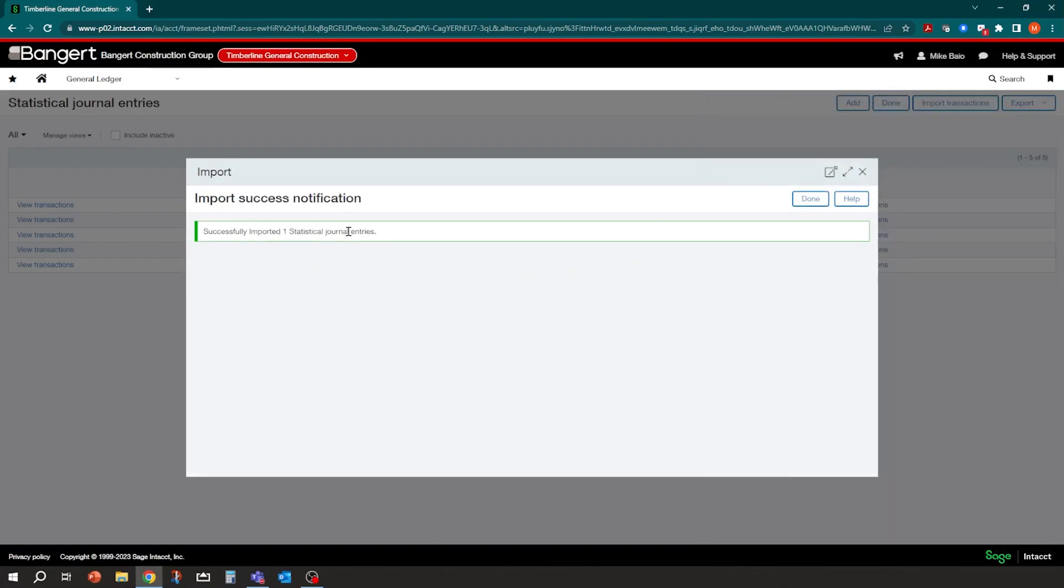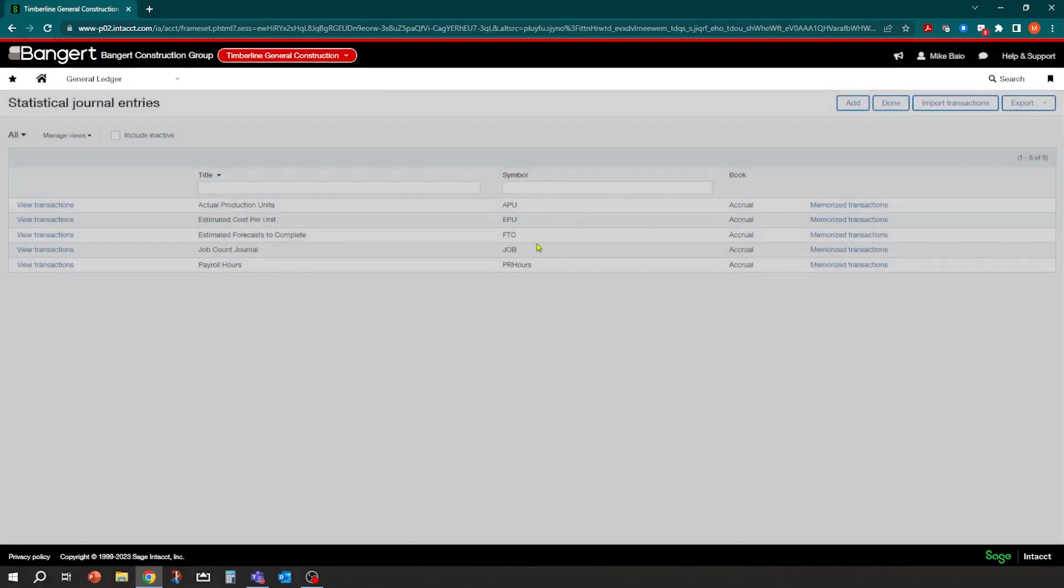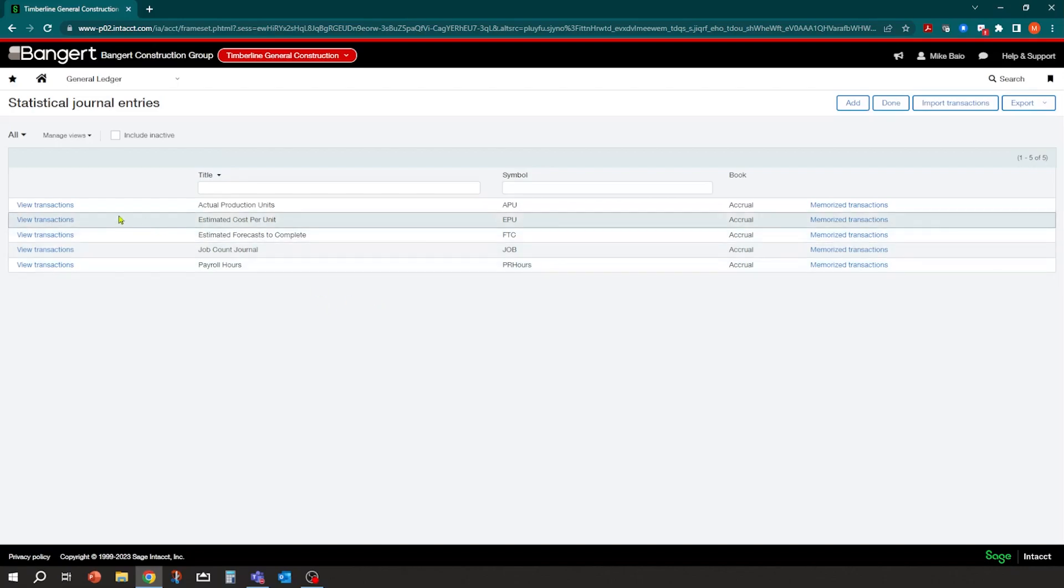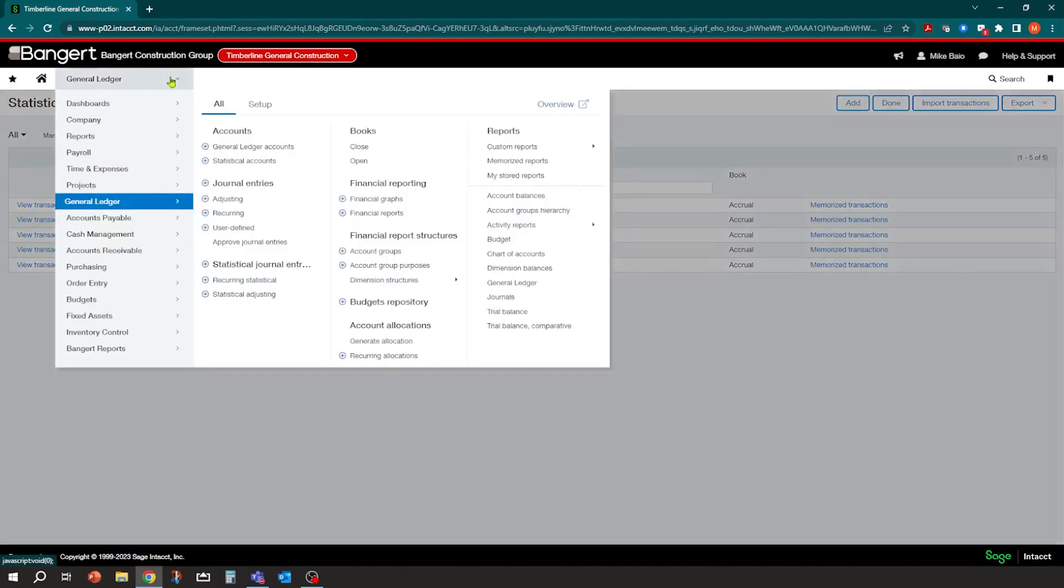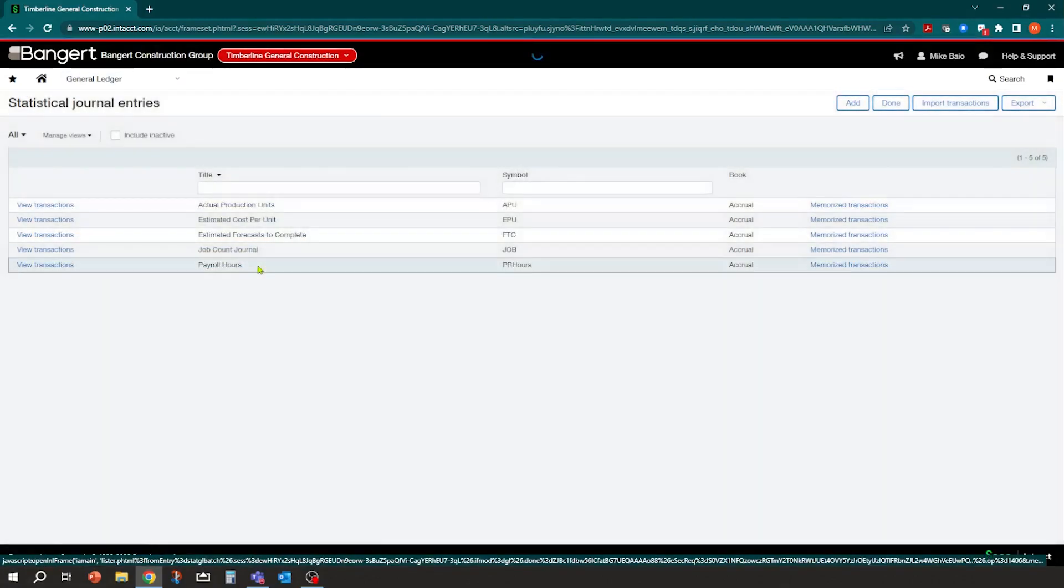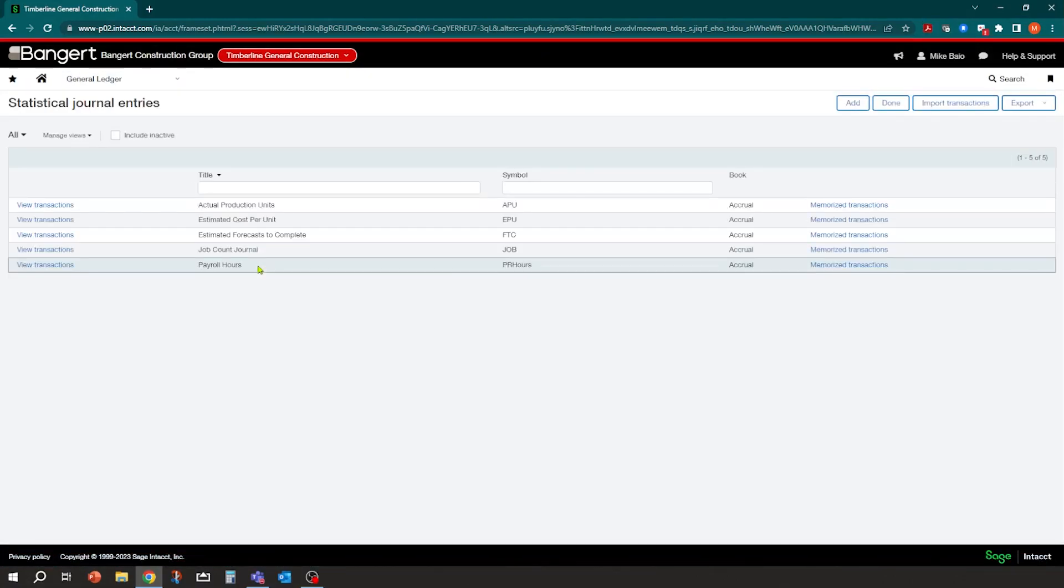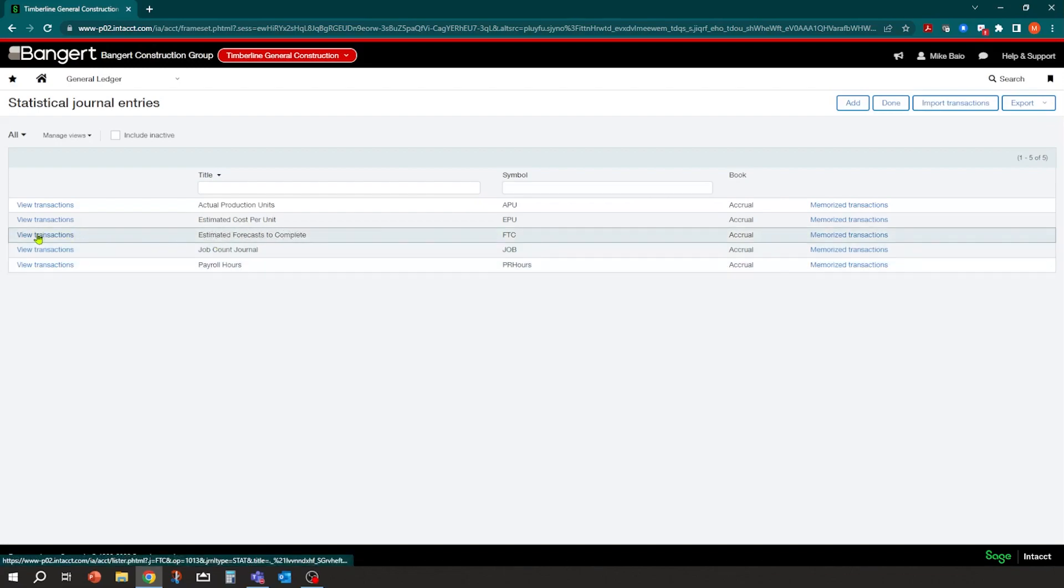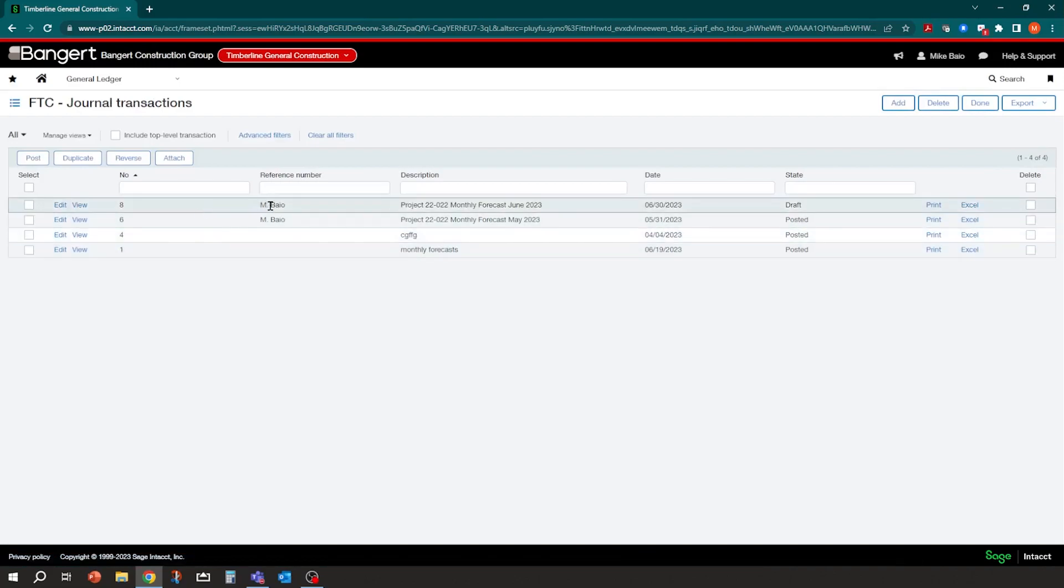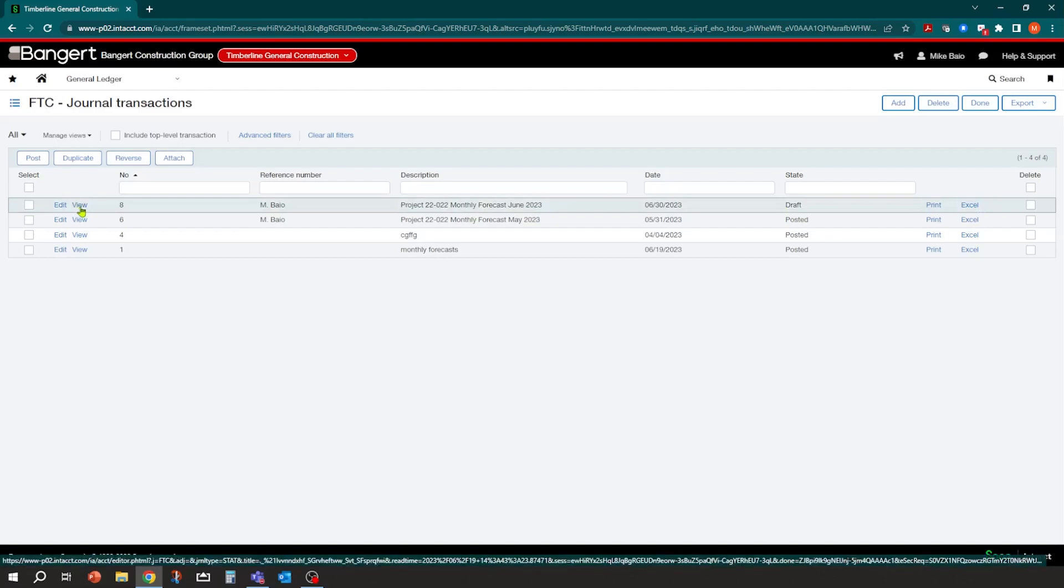Now, one of the things I did was I set my import up to draft so that when it imports in, it imports it as a draft doesn't post yet. I'll have a chance to review it first. I can delete it if I want, or I can edit it. So that imported in successfully. So now if I go to statistical journal entries, and now you notice I have estimated forecast to complete, I can view the transactions. And there's my new one. I put my name in the reference and I have my description job 22. And it's in draft mode. So I'm going to go take a look at it.